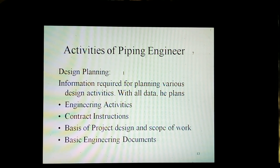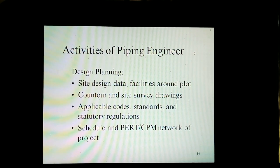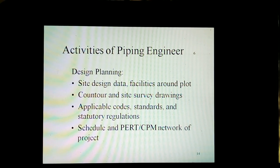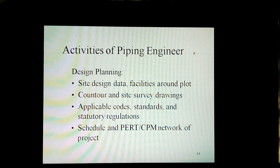Design planning involves getting information required for planning various design activities. With all data, the engineering activities are planned. This includes contract instructions, basis of project design and scope of work, and basic engineering documents. Design planning also covers site design data, facilities around the plot, contour and site survey drawings, applicable codes, standards, and statutory regulations, and schedule and CPM network of the project.